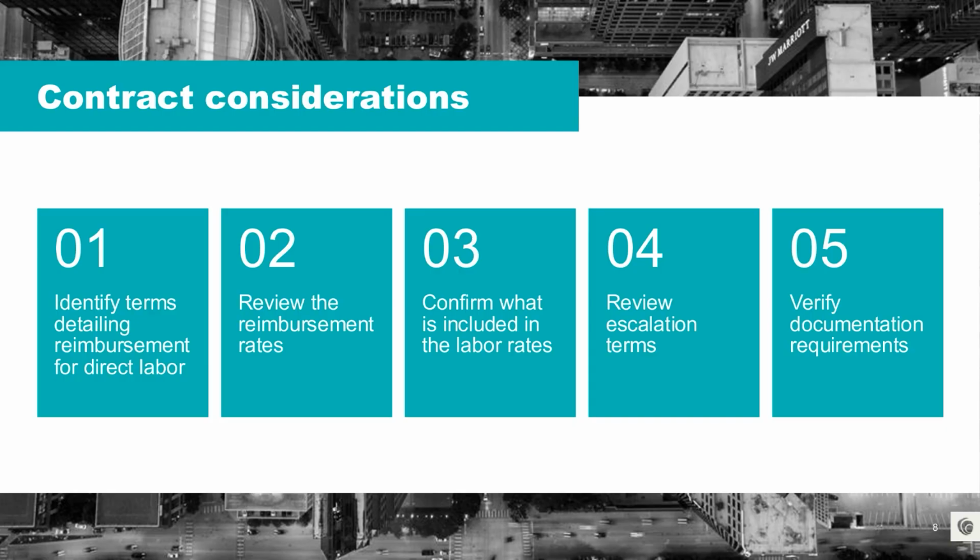Verify documentation requirements. This is going to be key for you to verify compliance as you audit and review labor throughout the project. So verify what documentation is required to support labor charges. Contracts should typically mandate items like payroll reports, timesheets, and possibly third-party verification. Strong documentation requirements protect both parties and reduce the risks of disputes and regulatory issues. So by systematically reviewing these 5 areas, you can ensure labor costs are transparent, compliant, and well controlled.